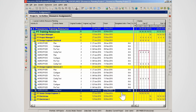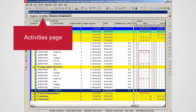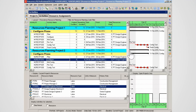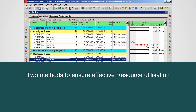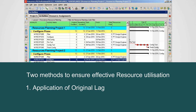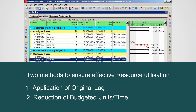Note the new labor units distribution. Return to the activities page — resource PT Deal is no longer over-allocated. The daily utilization on the two activities falls within the daily resource availability. This works provided that work can be completed in the allotted time. Resource PT Deal 3 is also no longer over-allocated. We have demonstrated two methods to ensure effective resource utilization: the application of original lag, and the reduction of budgeted units time.